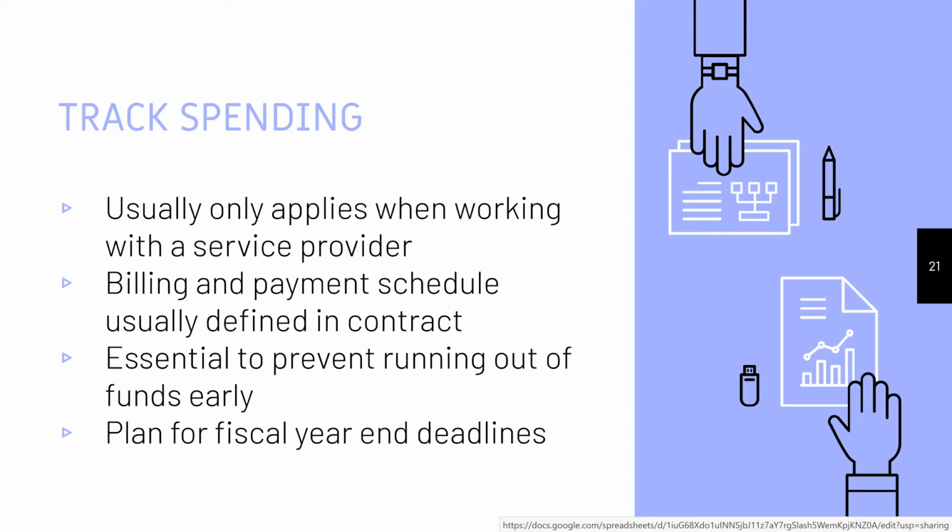And typically, like for SFU and most institutions in British Columbia, the public institutions are funded by the province, and this varies by province, and it probably varies by state for public universities in the US. In SFU's case, the fiscal year runs from April 1st and ends on March 31st. That's the fiscal year on paper, but the actual deadlines for spending in that fiscal year are different, because the finance office at SFU needs time. Everyone at SFU is spending money late in the fiscal year because they know they can't carry it over easily.